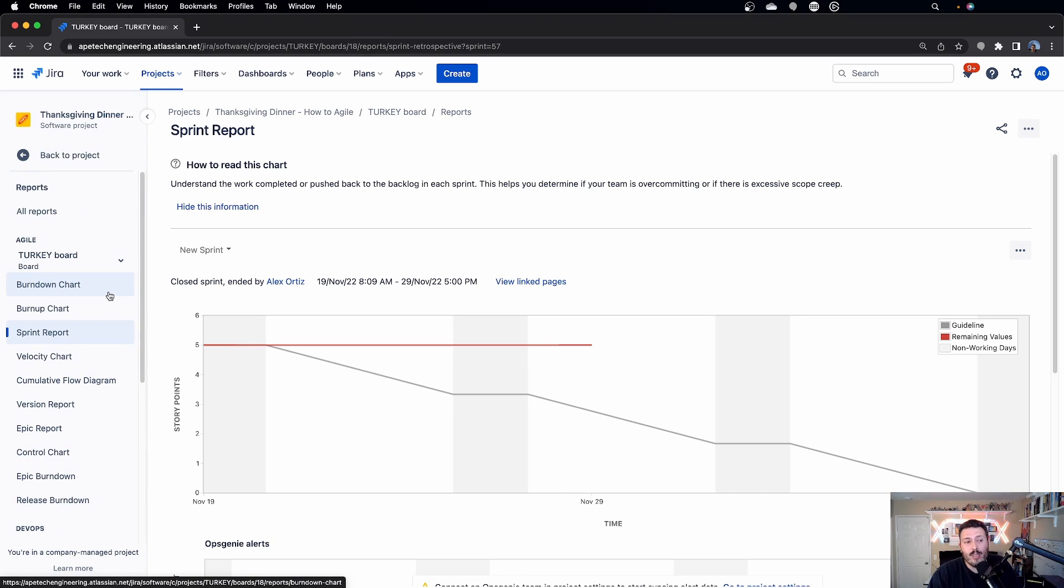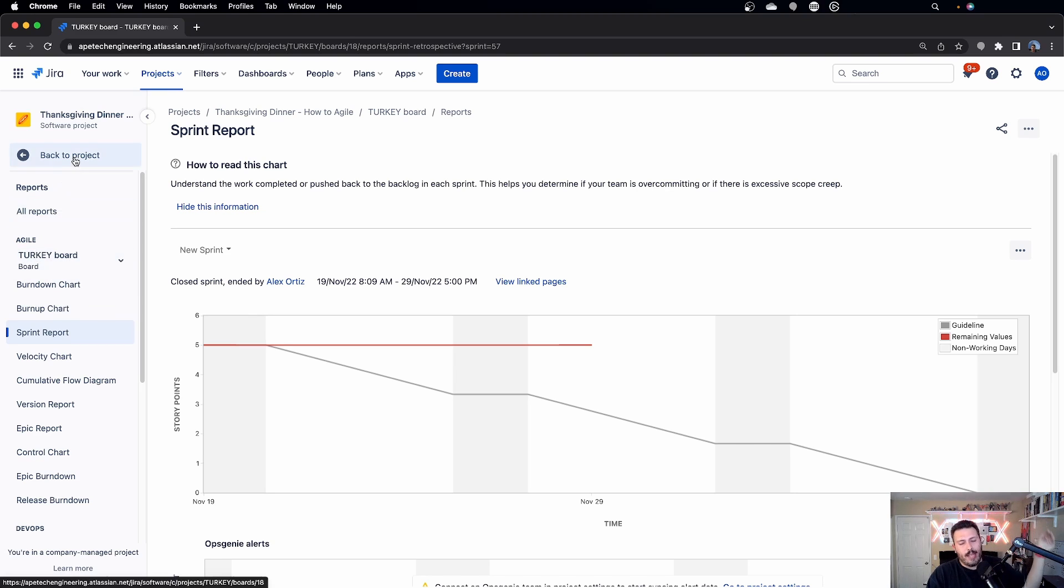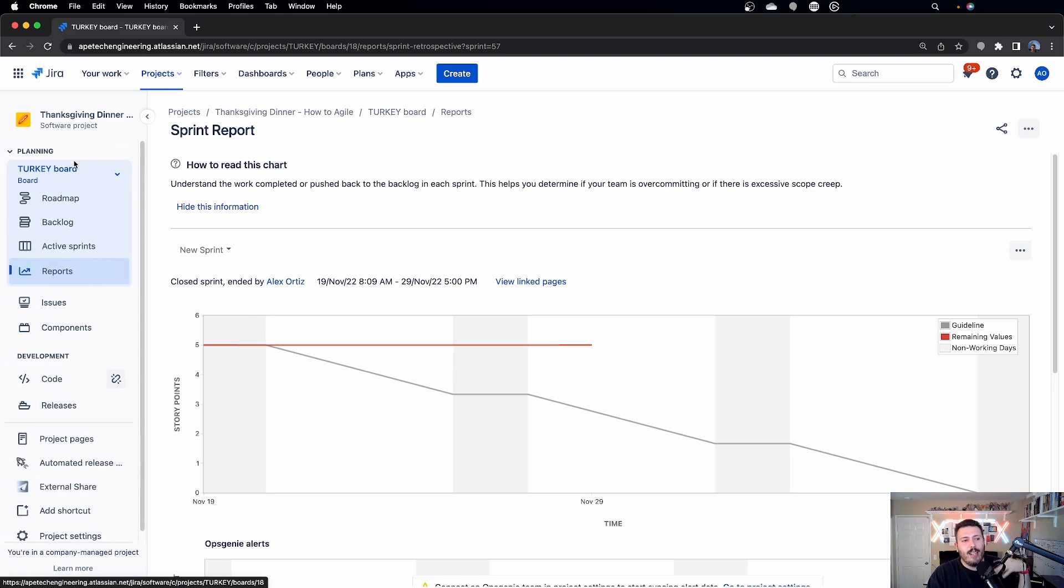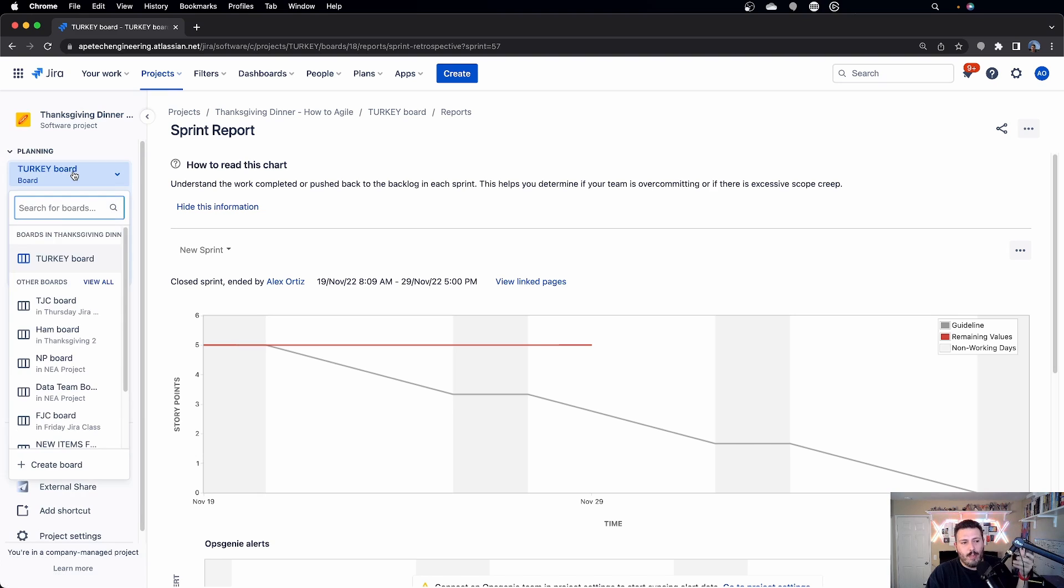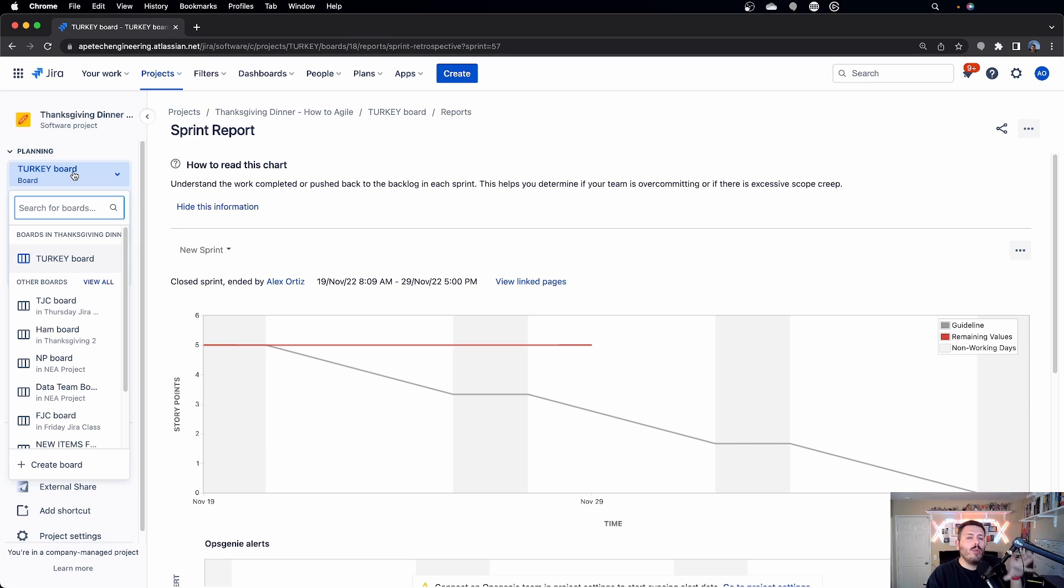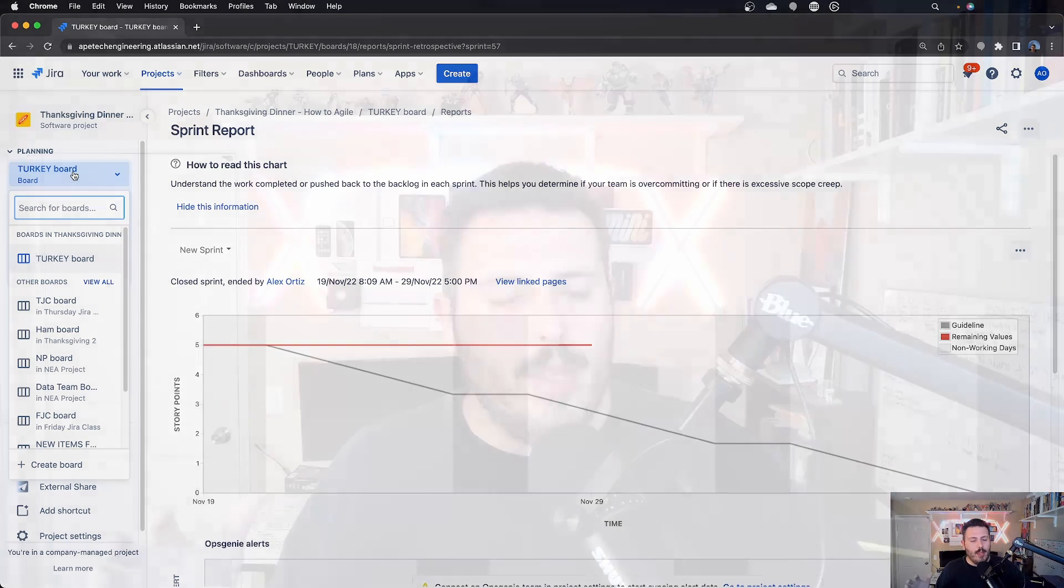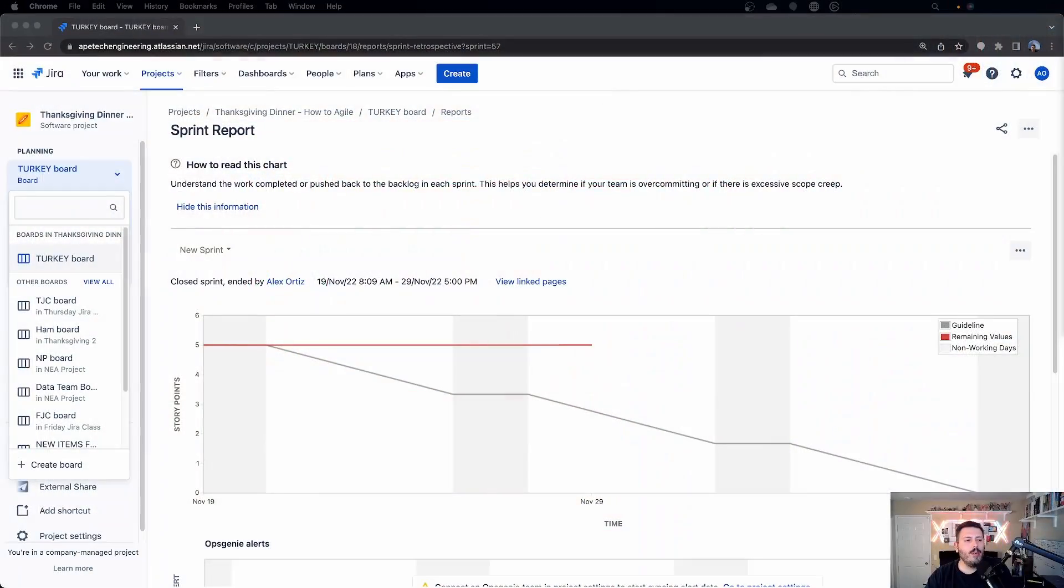Now, another little tip for you is you can actually change the board here. You don't have to go back to the project and then select a different board. And with that, a second tip is each board will have its own unique set of reports. So that means that if you have a Jira project that has multiple boards in it, don't expect to see an aggregated report. You're going to see a report per board and then per sprint.